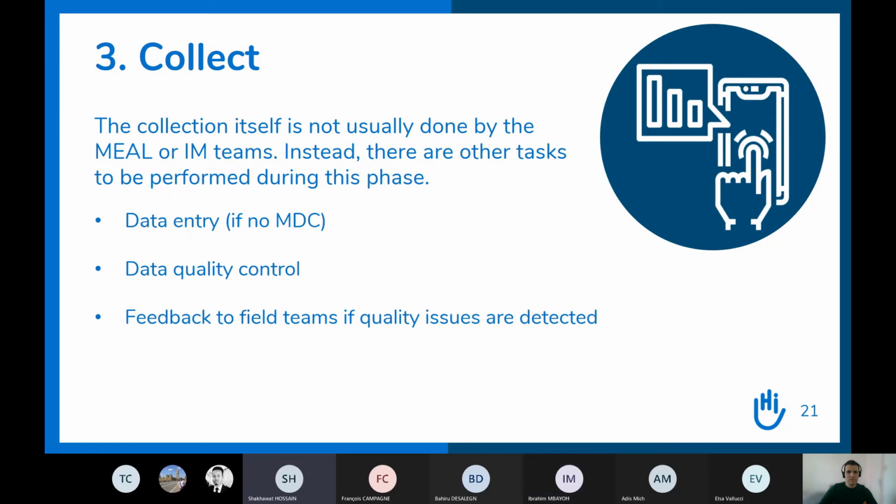Say for example, sometimes we are engaged in a huge sample size for data collection. It depends upon the population. If we hire more than 10 or 15 enumerators for the data collection, we need to have some plan for field management. It would be good if we can hire some supervisors for the enumerators. What I ideally did previously was to select 1 supervisor for every 5 enumerators.